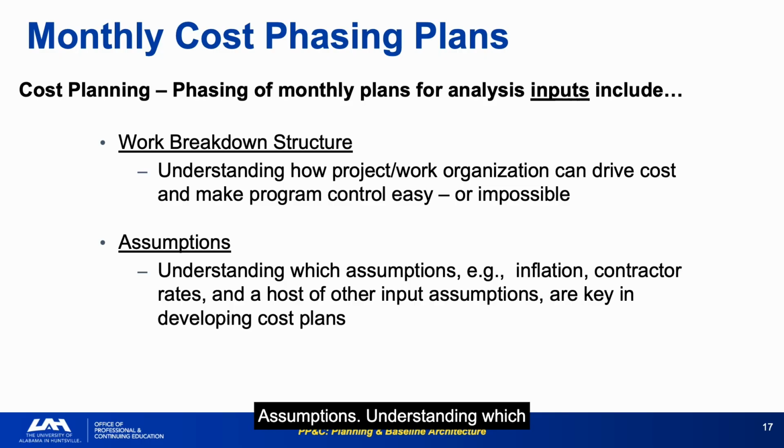Assumptions, understanding which assumptions, e.g., inflation, contractor rates, and a host of other input assumptions, are key assumptions documented at formulation time become the comparison baseline for execution analysis. If inflation came in higher than assumed, that's a known driver, not a mystery.